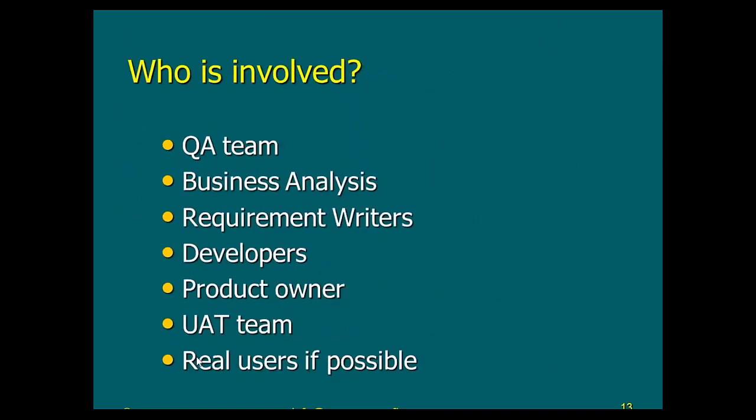First of all, as I say here, everyone should be involved in the validation process. As you can see, I even included the user acceptance testing team here. In my experience and from hearing what companies have been doing, the UAT team is probably the best thing you can add to the scenario validation process. Why? Because those people know some of the scenarios that happen in production based on their communication with the business, if they are close to the business.